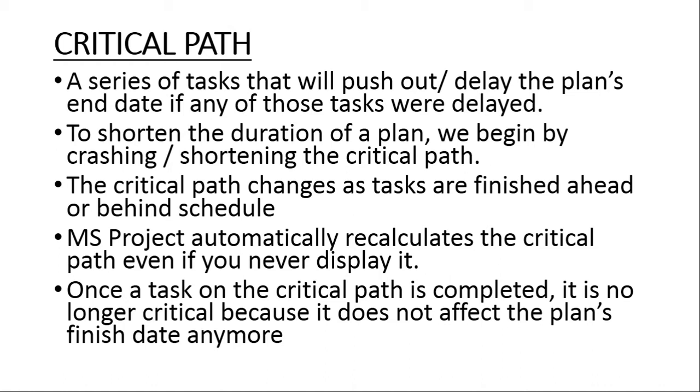So when you are talking about a critical path, it is a series of tasks that are going to push out or delay the project's end date or finish date if any of those tasks were delayed. So in other words, each task is critical because it cannot be delayed. The moment you delay any one of those tasks, it also delays the rest of the project.